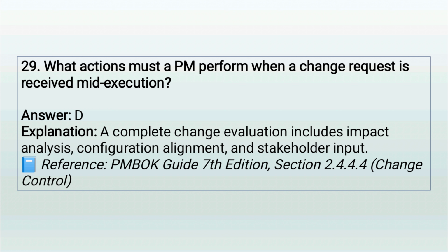Answer: D. Explanation. A complete change evaluation includes impact analysis, configuration alignment, and stakeholder input.